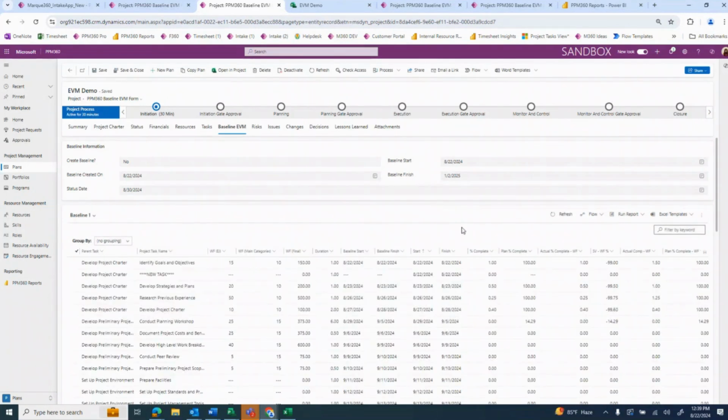So as you can see here, I have the start and finish date, but the baseline fields remain empty since that field wasn't there. Now, when I run my second baseline, then that baseline start and finish will copy over these current ones for baseline 2. But since this wasn't present when I set my baseline 1, it will not show up. This is another way to identify changes in the schedule by identifying tasks that weren't there before.